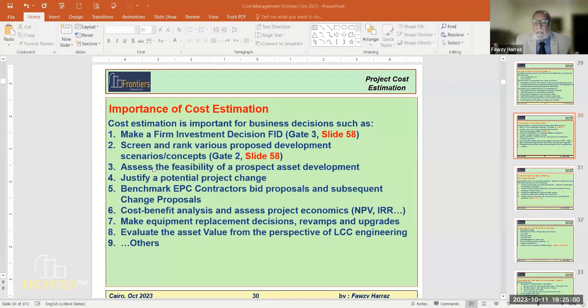So the costs and the benefits associated with it shall be weighed, and as common sense, if you're making a change that costs you $1 million, the payback should be, say, $1.3 million or $1.5 million. But if the cost is 1 million and the payback is 1 million, or the payback is 900, it's less than the cost. So this means cancel the proposed change. This is the intent of a cost benefit analysis.